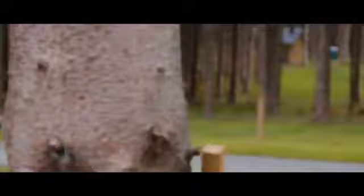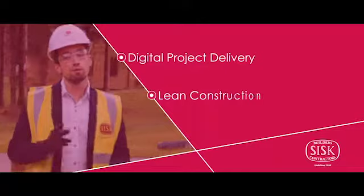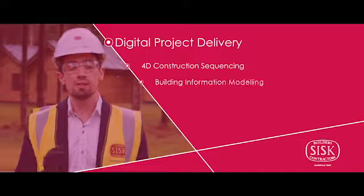The two most significant innovative techniques we've used at the lodges have been digital project delivery and lean construction. Digital project delivery, we've used four key and particular tools, which have been 4D construction sequencing, building information modeling, Asta Progress mobile app, and Field View.